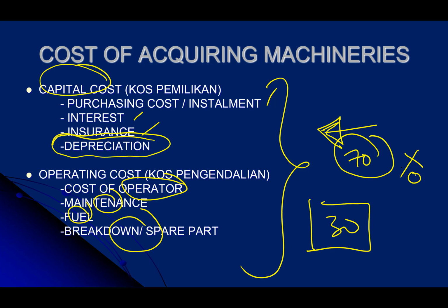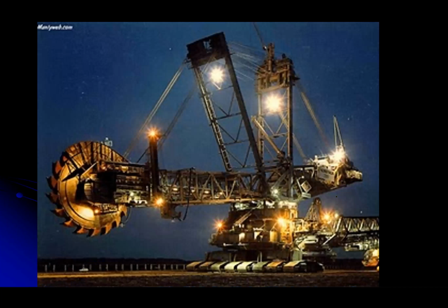That's how, if for instance you want to compete with an old contractor who has been established, who has purchased all kinds of machinery, you simply cannot compete. Why? Because you need to pay 100 ringgit for the machinery, whereas the old contractor only pays 30 ringgit for the unit rate of the machine, because he already owns the machinery. The only cost for him is the operating cost. There is no more capital cost. So the biggest part would be the capital cost.